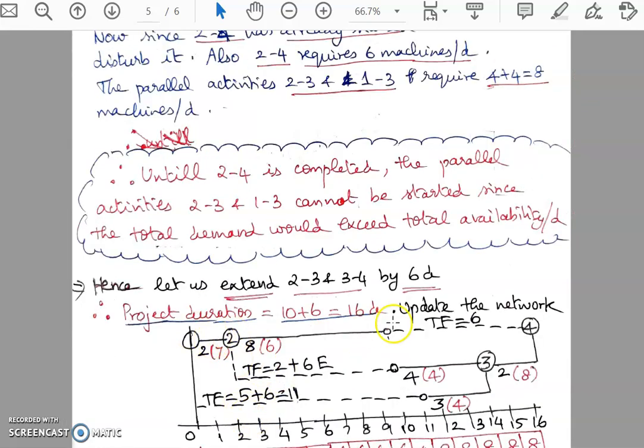As you can see here, the reflection on the duration is 7, 7, then 6, 3, 0, then 4, 8, 8 for the remaining 4 days. So this is the change we are able to get. Every day, this change has brought about complete balancing of the project up to the 16th day. So on all the days, the total demand is less than or equal to the availability. Hope you are able to see this graph.